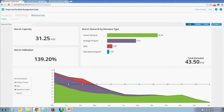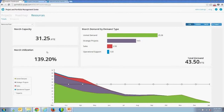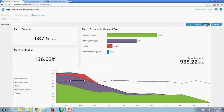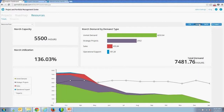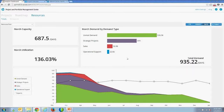Looking at the overall organization, I have 31.25 FTEs in March with utilization currently at 139%. You can switch between FTEs, hours, and days — all associated values update accordingly. In FTEs capacity is consistent across the timeline, but switching to hours makes it variable due to holidays and working day calendars. The same variability applies in person-days.